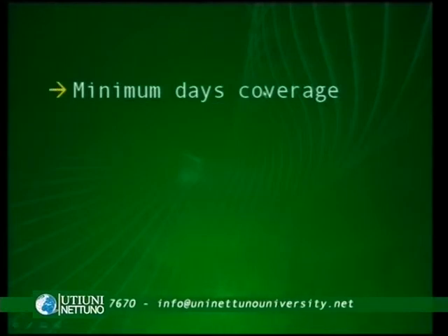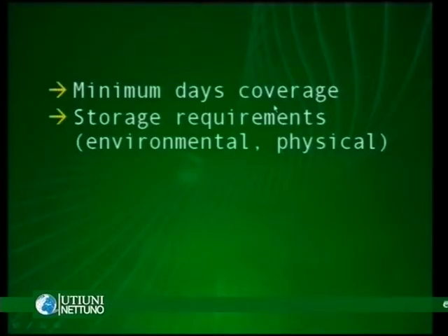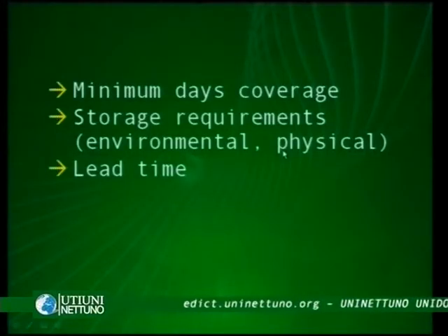Minimum days coverage, which is the equivalent of days for the security stocks. Storage requirements, environmental, physical, like temperatures and things like that. The lead time, which is the time for purchasing the material and obtaining the transformation of it.